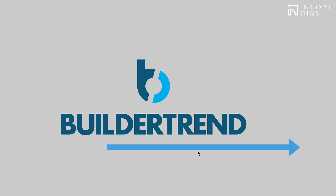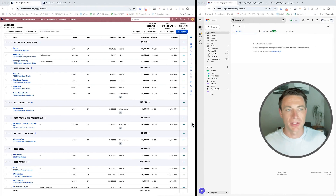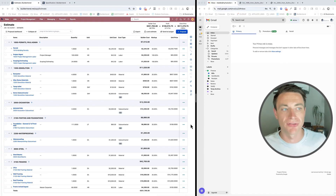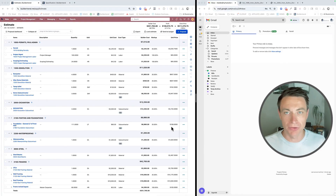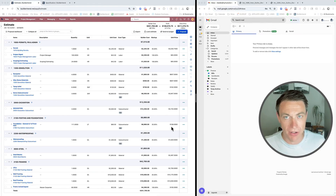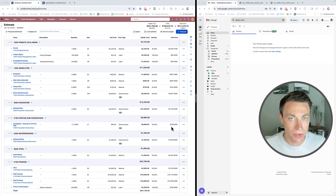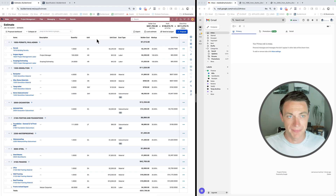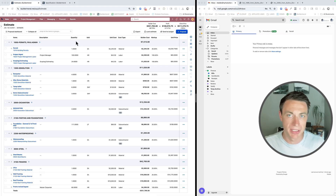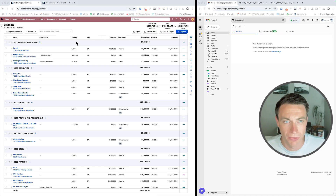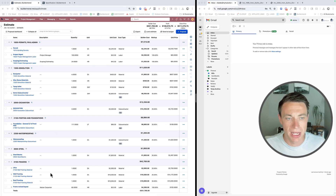I like to initiate my bids from an estimate. We want to get to a point where we have our estimate in BuilderTrend. If you're using BuilderTrend to create your estimate, great — you're already there. If not, use some other system but upload it into BuilderTrend always. The only way we're going to be able to use the job costing budget, the bids, the purchase orders, and see if we're actually performing to plan is if we get our estimate into BuilderTrend. I have some videos on how to import as well.